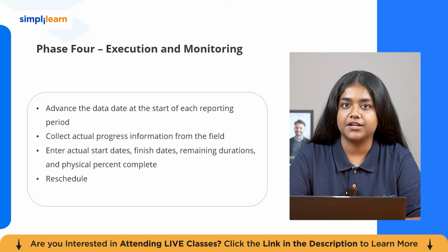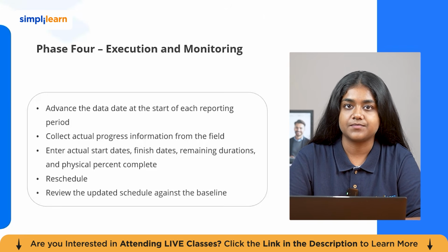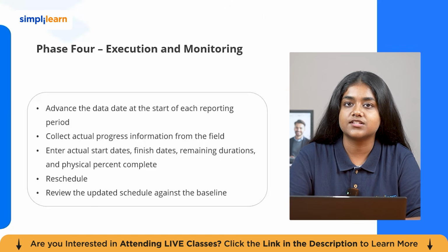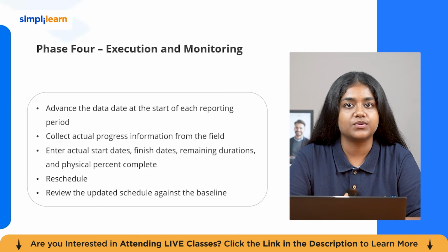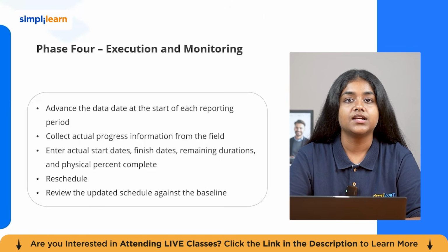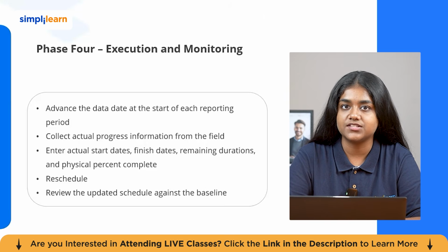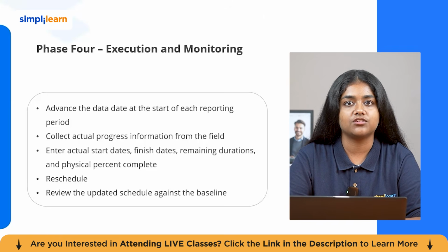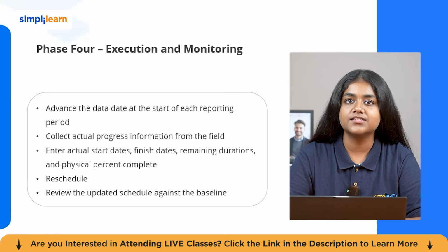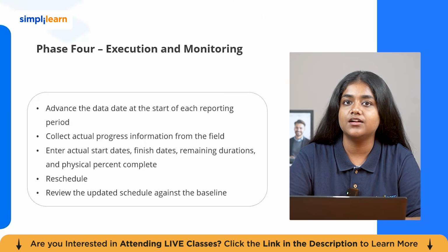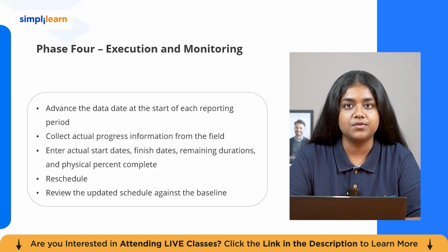After the project is updated and rescheduled, you calculate and report earned value metrics. You also monitor thresholds, resolve issues, update notebooks with key decisions and observations, and generate reports for stakeholders. This gives you and the project team a clear view of schedule performance, cost performance, risk, and corrective actions.